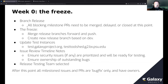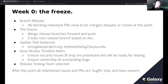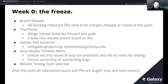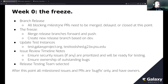For the actual freeze, once we've gone through the list and all blocking milestone PRs have been either merged, delayed, or closed, the freeze entails making sure all the branches are merged forward and creating a new release branch — release_23.1 for the next one. That becomes a stable branch and only bug fixes go to it. Dev continues as normal, and the whole point of the freeze is that with no new features going into the forthcoming release, developers are free to focus on bug fixes.